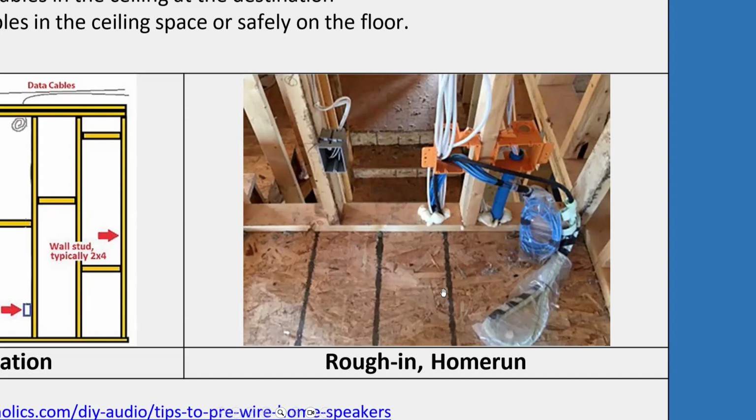There will be other trades. There will be flooring people. There will be drywalling people. There will be other kinds of trades coming in. Who knows who else yet? And they will be stepping on the wires. They'll be pushing them aside. And by the time I get back, those wires are going to be so destroyed that I'm going to have to think about pulling new wires, which is going to be more difficult because the drywall is going to be installed.